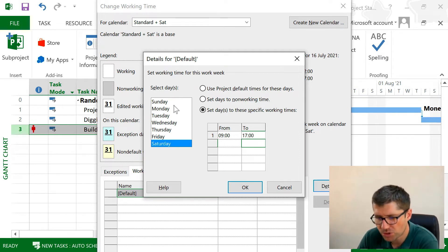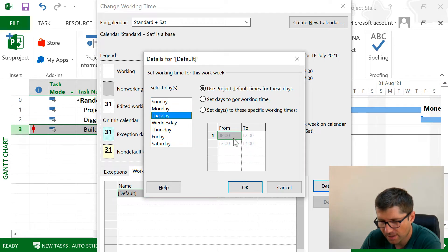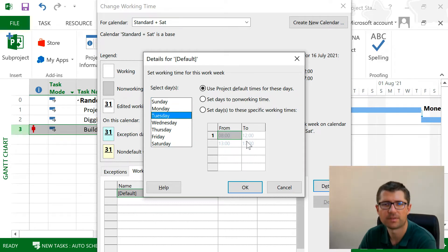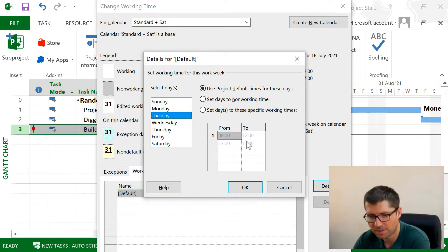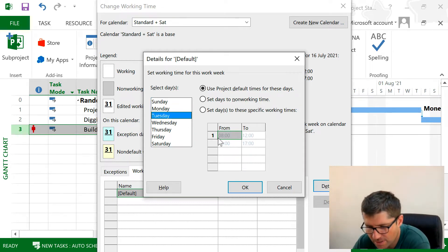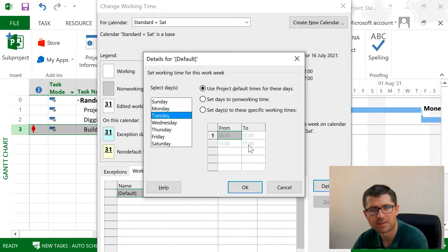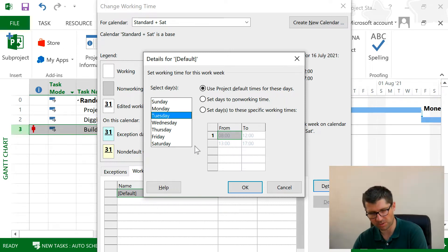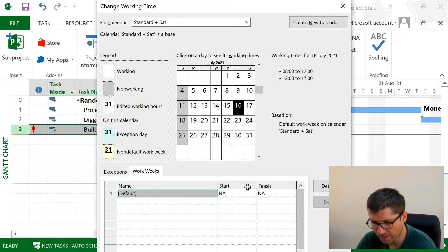I can also change the number of hours I have here for each and every day if I want to. In this case, it's very interesting to see that I have four hours and a break and then four more hours. Good, click OK.